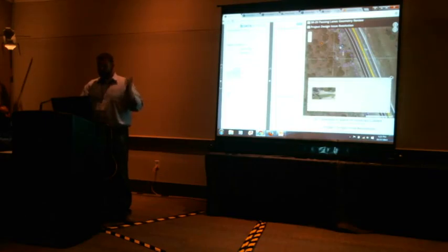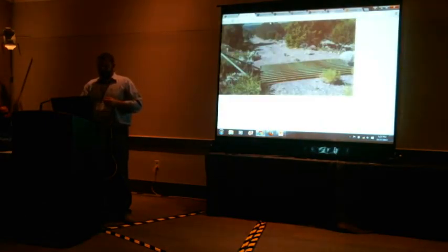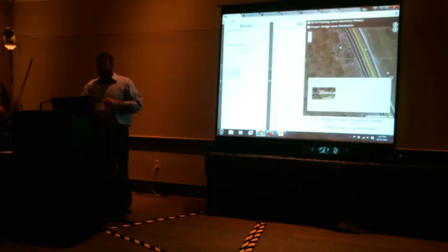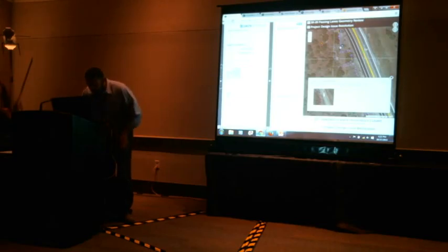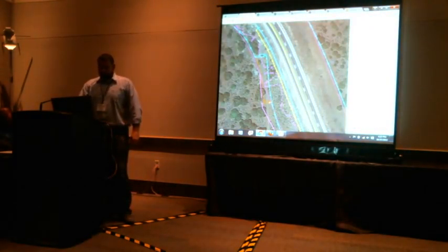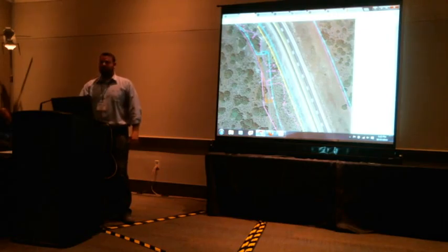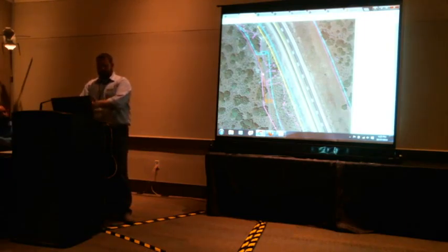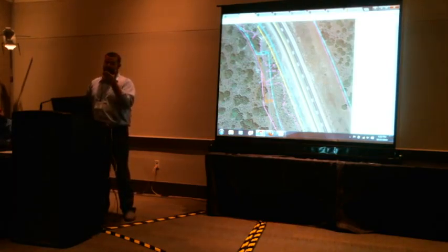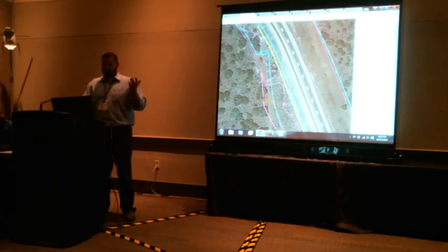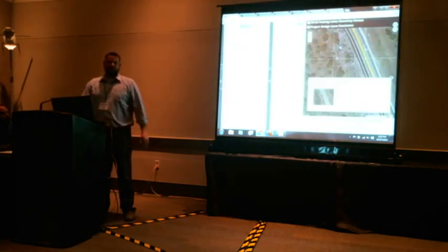He took a picture. This is a picture of the cattle guard right now. And through his milestone meetings, he said, well, what if we just took that cattle guard and we put it down the road, that dirt road a little bit? Would that resolve our issues with this? There's a fence line they had to deal with, and then that fill line. And it satisfied the requirement to move that. And again, he just showed it in this application.